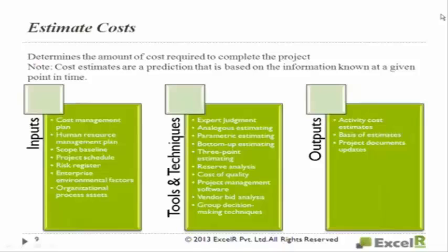What is the best method or the benchmarking? Like we should have a future value always, or we should consider present value for the estimation? Normally, if the size of the project is small, I mean the duration of the project is small, they consider the current value. Say 3 months project or 4 months project or 5 months project. If the project is long term, say 3 years or 5 years, one way of doing it is they take the current value and they add the inflation rate to that.